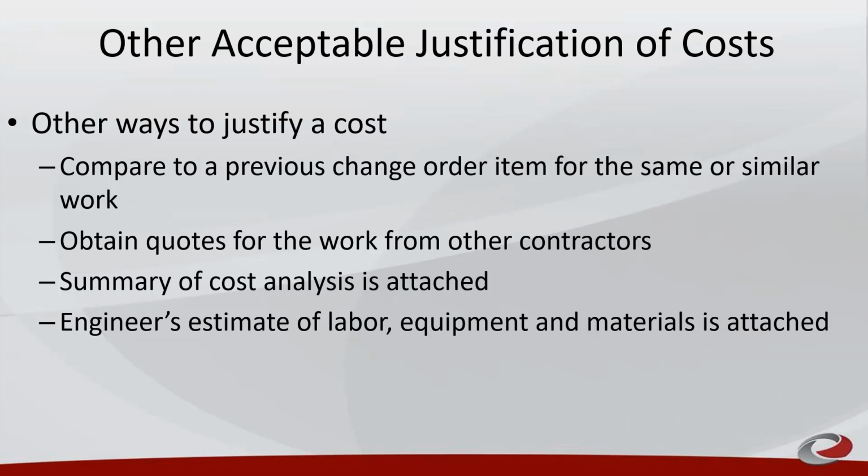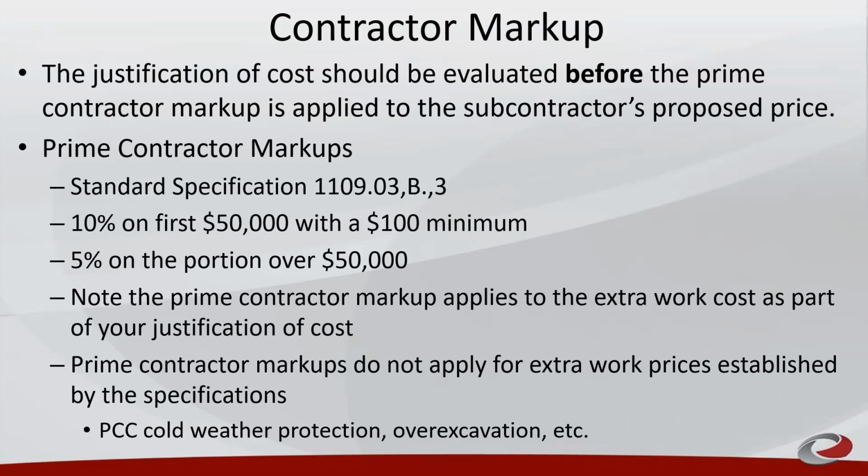Make sure to provide the analysis with the draft change order to be reviewed. The justification should be evaluated before the prime markup is applied. Here is the allowable prime contractor markups according to standard specification 1109.03.